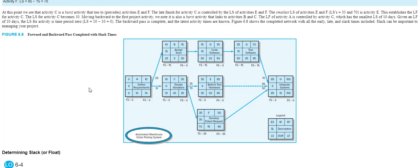The conclusion of the forward and backward pass, whenever you see a number in the middle, for example, B has 15, D has 15, G has 15, that's the number of days you can delay that activity without delaying the overall project, and that is referred to as float or slack. So B, D, and G have 15 in terms of float or slack. F has 35.